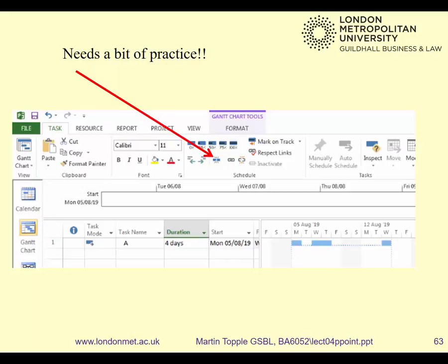So we've got a task A, which is going to be 4 days long. Here it is. Normally it will be just 4 days in a row, Monday, Tuesday, Wednesday, Thursday. But what we've done, as you can see, is split it into 3 chunks. So I'm going to do a day of it, have a gap, and then another gap, and that's in total 4 days. But it's spread now over about, I don't know, 8 days, is it? But it's only 4 days of paid work. Okay? That's the key point.